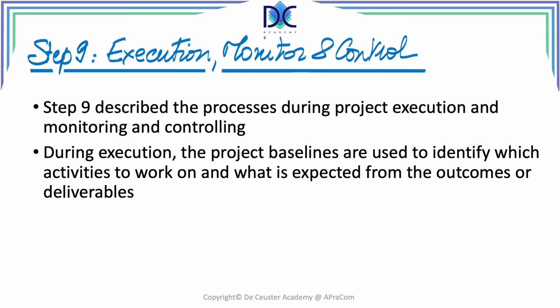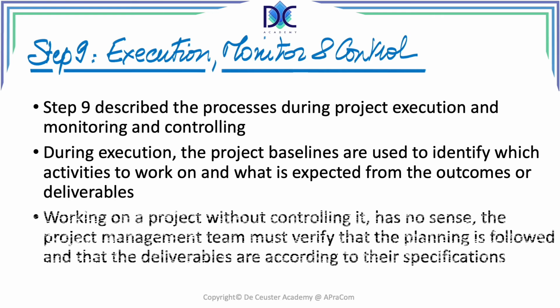The execution is the part where we start after the project plan has been approved, and we use the baselines to start working. The baselines provide us with start and finish times of all the activities. We also have the scope, we have the description of the activities, and basically what we can do here is to verify that the work is done according to specification.